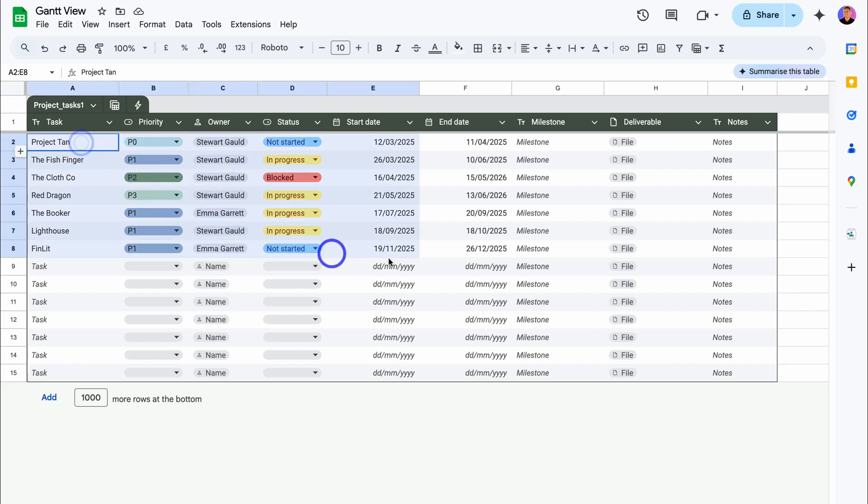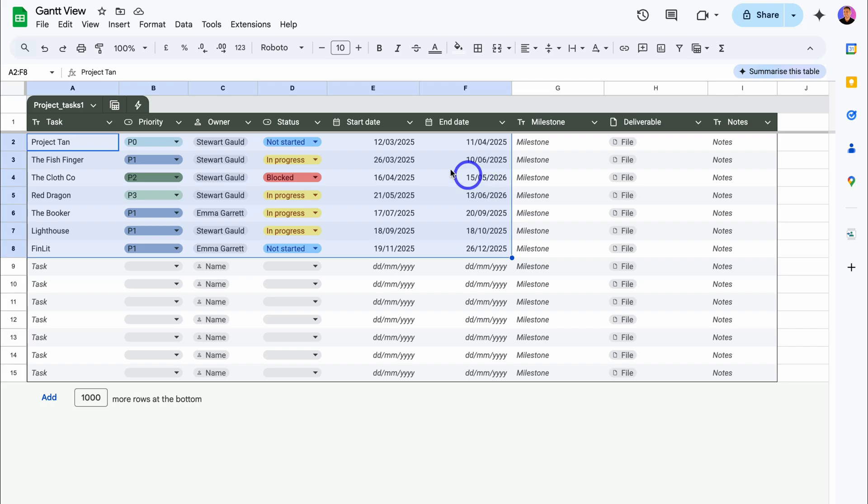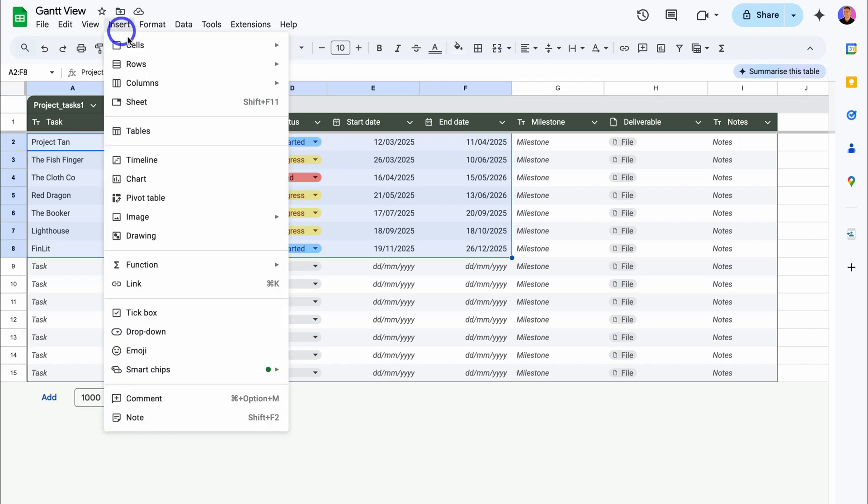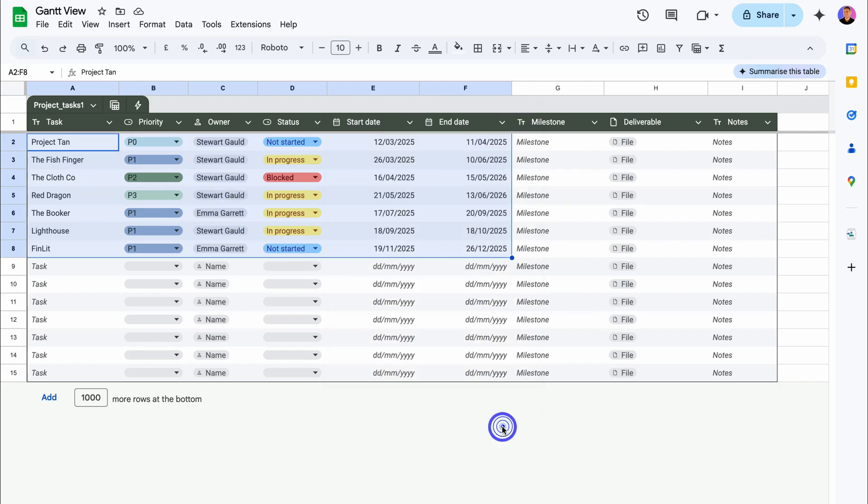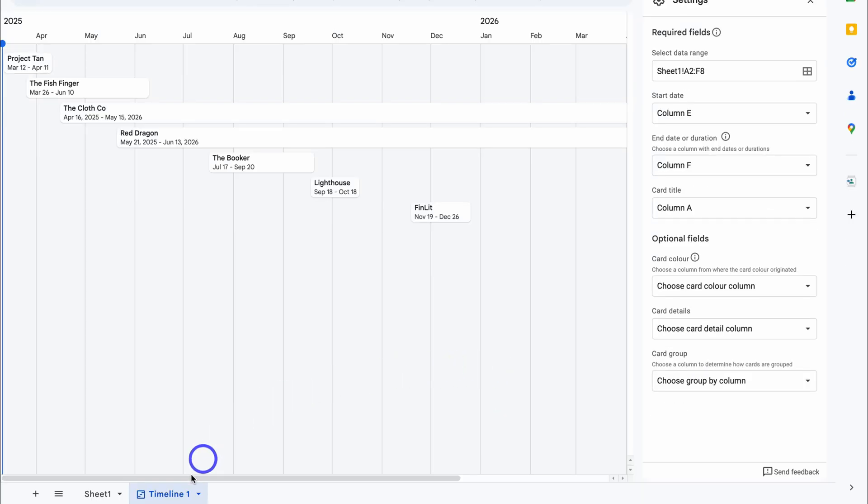Now what I can do is highlight the data—for example, these tasks over here and all of these details. You want to make sure that you have a duration. Here we have a start date and end date. Then to create your own dynamic Gantt chart or timeline view, simply navigate up to Insert and then locate Timeline. You want to highlight your data—I've already gone ahead and done that.